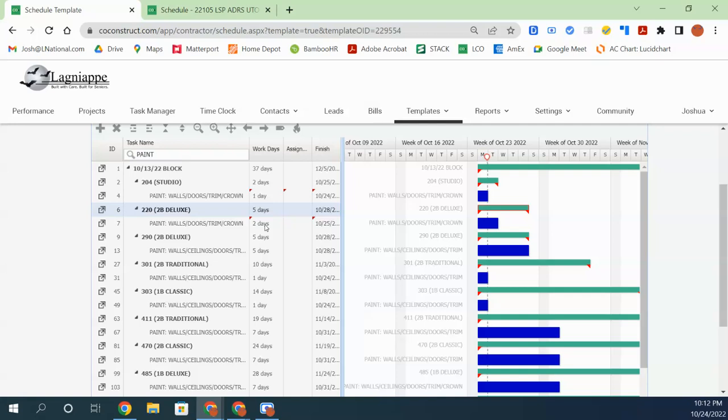Most tasks of a schedule you're able to do this way. Once you define the unit of measurement, whether it's linear feet of something or square yards of carpet or whatever the unit is, and however much can be completed in a day, then go from there and simply take however much you have and divide it by that completion rate. Anytime you do this, always put how you got your math in a note that's visible to the trade partner.